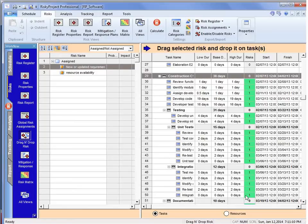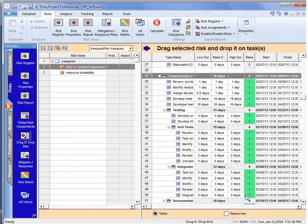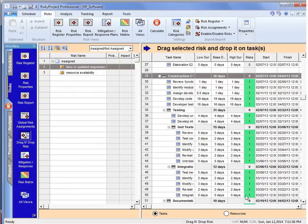Typically, what we're doing, we're assigning the risk with a probability that it will occur, an outcome, what's the outcome type? It could be cost or schedule, it could be actually non-cost or schedule, and the impact of that is if it's a schedule, then it's going to be the percent or fixed amount that it will impact it. If it's a cost, it could be a relative cost, a percentage of the cost, or it could be a fixed amount.